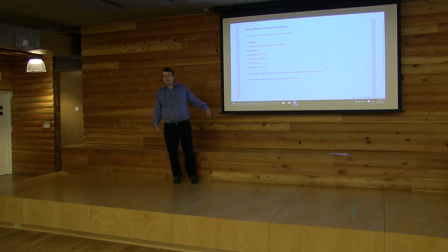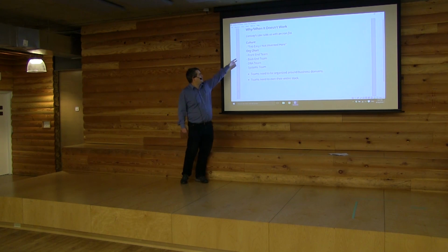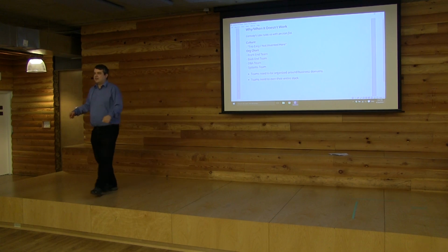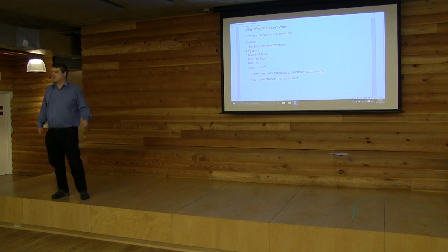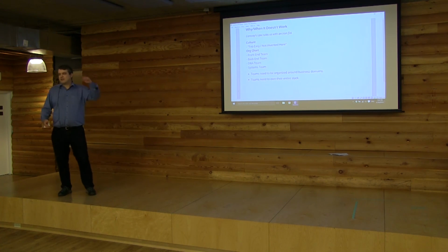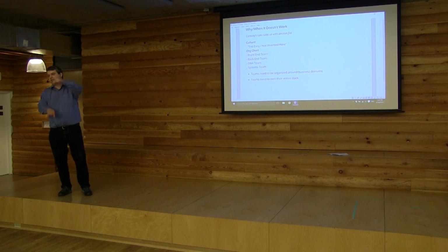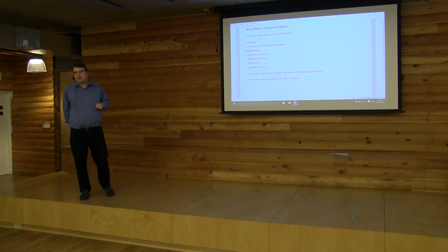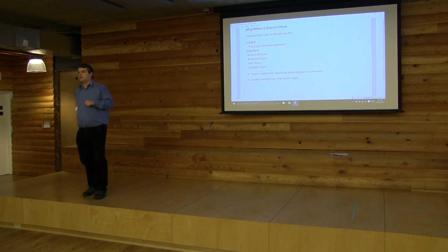This is probably familiar to some of you. You tend to have the org chart reasons. You have a front-end team, a back-end team, perhaps a DBA team, and then a systems team. There are sort of wedding cake layers. It practically guarantees that things move slowly and badly because they constantly have different priorities and constantly have to coordinate all the rest of it. For this to actually work, your teams have to be truly cross-functional.